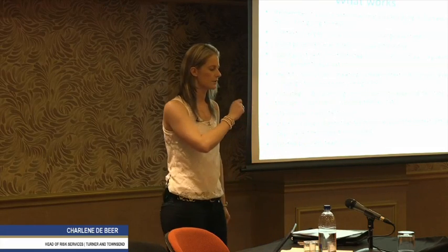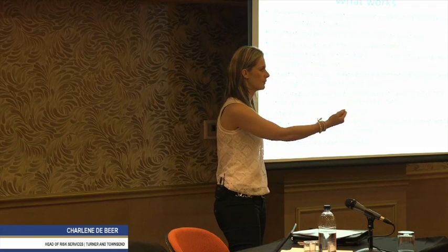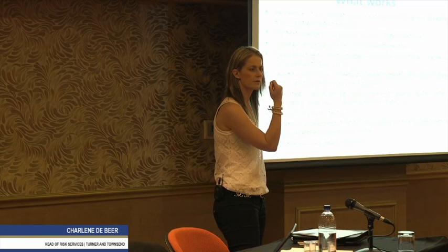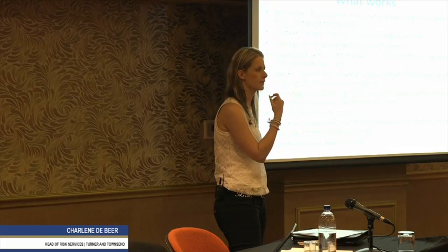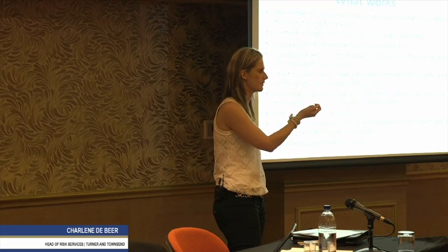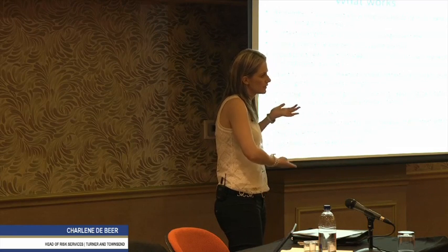So whatever you promised or said you were going to do, if you don't do it, now I can hold you contractually liable. And not a lot of people know that. That's one of the risk mechanisms that we have at our disposal. You contractually bind that contractor or client, saying, well, you promised me. So under 16.4, we've minuted it, it goes into the commercial risk register, there it goes. So it protects you from a commercial contractual point of view as well.